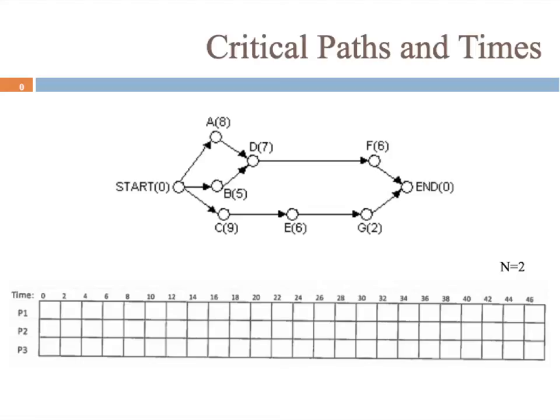Notice at the ending point, critical time 0. Looking at task F, we would take 0 and add the processing time of 6, so its critical time is 6.